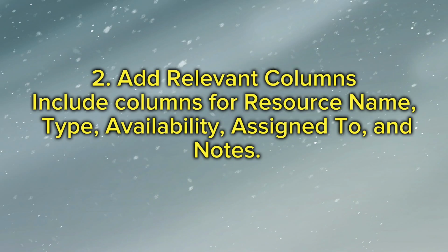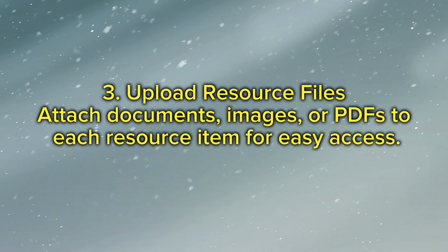2. Add relevant columns. Include columns for resource name, type, availability, assigned to, and notes. 3. Upload resource files. Attach documents, images, or PDFs to each resource item for easy access.